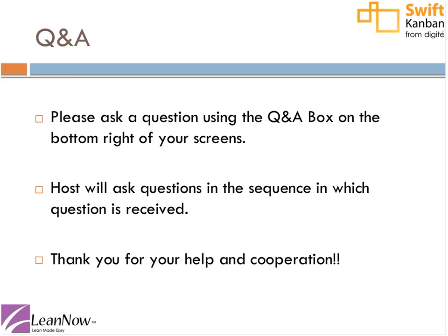For organizations that have more variation in customer input over the weeks or months, the backlog board is a place to keep the overage when it can't go onto the board, and it also lets them prioritize work so they start the right things into work in process. So it can be an advantage to buffer you from your customer if you can't respond to all your customer requirements right away. What we hate to see is people just stuffing the ready column on the Kanban board with weeks and weeks and weeks of work. So I wouldn't expect that ready column to have more than a week of work in it at any one time. Everything else needs to go into the backlog.